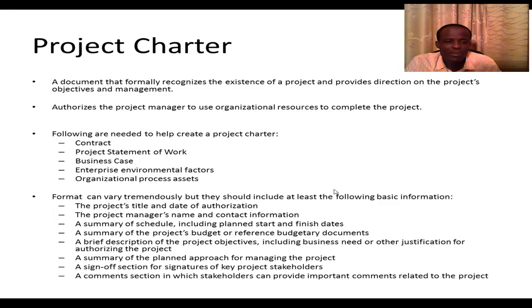Now, before a project charter can be created, there needs to be a contract between a customer or client and the contracting organization. There needs to be a project statement of work. There needs to be a business case. There needs to be enterprise environmental factors, or we need to have known the enterprise environmental factors and the organizational process of it. Several formats exist for project charters.